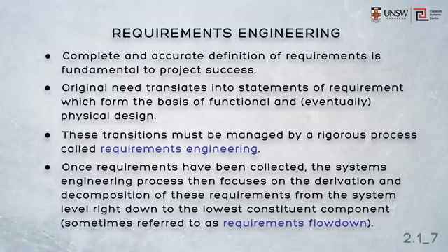This process requires elicitation, that is identifying the requirements, analysis of those requirements, definition, validation, and then management of the requirements. Requirements engineering ensures that a rigorous approach is taken, therefore, for the collection of a complete set of unambiguous requirements from the stakeholders so that the system development can begin.